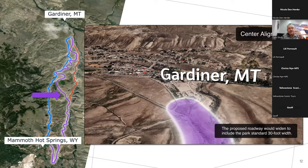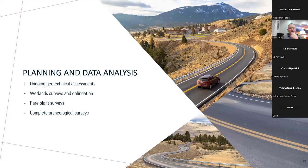We haven't chosen a preferred alternative. We're going to do some Q&A here and we'd love to hear your viewpoints. Last year we did roughly nine boring holes in different areas to measure soil sliding, and we're doing 14 this year. Some questions around why we're not moving faster — we've got to get that geotechnical work done. There are also other surveys we always do with any project, which we'll be working on.